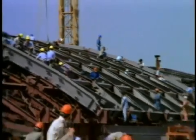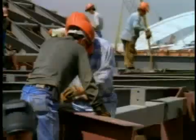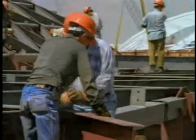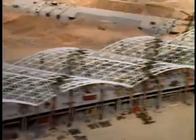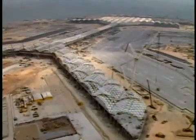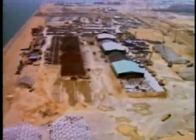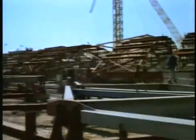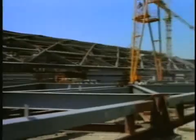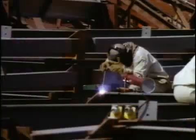While negotiations continued, engineers pressed ahead with the daunting task of raising the terminal roof. Luckily, the design itself was remarkably simple. It was made up of a repeating lattice of steel trusses that could be mass-produced on a gargantuan scale. Builders set up an enormous assembly line to build 136 identical roof segments, each weighing 140 tons and crafted out of more than 100,000 individual pieces.